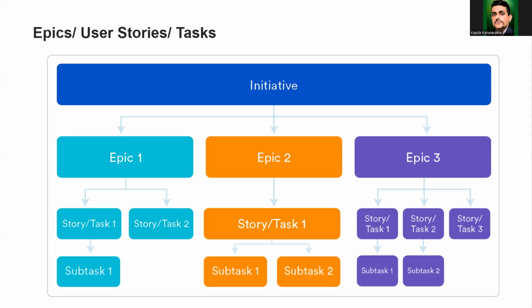Subtasks will be the activities you are going to do. The development team will develop the connection to Google Maps, and that will be one task. The QA team is supposed to develop the test cases for that and run and execute them, and that will be another subtask. So this is how we manage requirements. Basically, requirements come as epics and user stories.